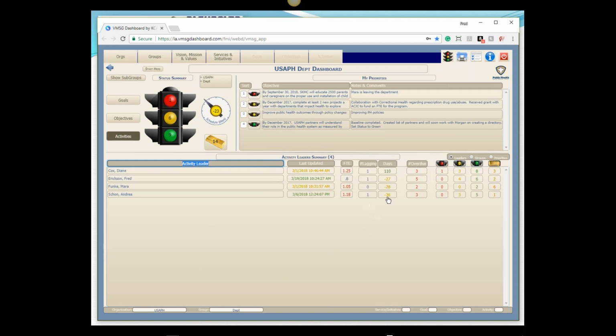That's good. Lagging in days shows me the number of activities calculated to be lagging behind schedule, again color coded by how far they are behind. The days is the same as the schedule gauge you see up here, but for the individual person. Overdue is just that: the ending date is come and gone, and we're not yet 100% complete. The red, yellow, green, and gold is for the individual person, same as the traffic light up here. So that's view 1, which is people.